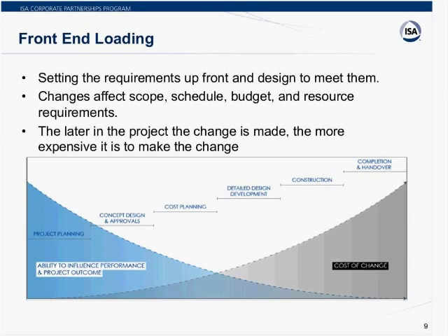The thing about that front-end loading and having the information at the right time is if you can do your front-end loading design, that early phase of design, so that you understand those full requirements, it's kind of built in. You've got it estimated. It's on the schedule, those kind of things. Rather than identify the need to make a change in the project as you go further down the line. And the curves here kind of show the cost of the changes go up dramatically on essentially an exponential curve the later in the project that you have to do things.